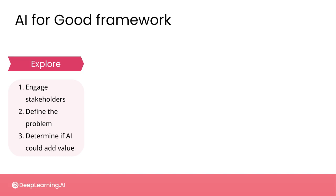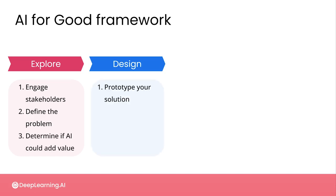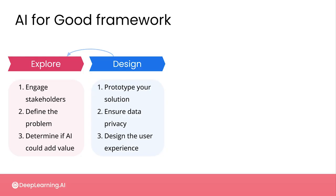Then, if your exploration of the project looks promising, you can move into the design phase, where you're prototyping your solution, developing your model strategy, investigating the data further, and thinking about how you ensure data privacy, as well as how potential users will be interacting with your system. It's possible that within the design phase, you'll realize that some of your assumptions coming out of the explore phase aren't holding up, and you'll need to go back and explore further, have more discussions with stakeholders, and maybe iterate on your problem statement. This can be an iterative process, and sometimes you might need to go back to a previous phase if you discover that you don't have what you need.